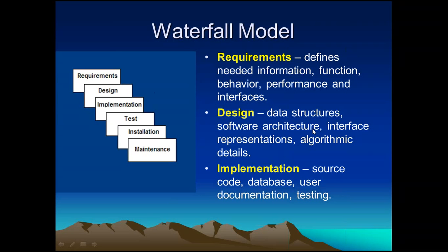The same approach will be followed for the design phase, implementation, testing, and other phases as well. So the waterfall model works as a sequential model. If at all you have specified a time and even though the time elapsed, if requirements are not frozen, you won't close the activity at all.